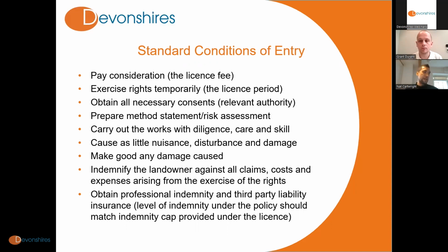There will also usually be a license period in there. There could also be hours in which you can operate and exercise your rights, so that's important to be aware of. And you'll often be required to obtain all necessary and requisite consents, things like planning permissions, any local authority approvals, certificates, and things like that.